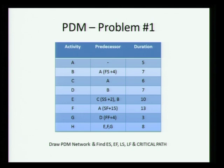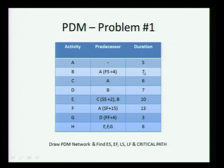Let us take up a problem which we will solve using these relationships. You have here all these activities A to H. When we say predecessor, it means for B the predecessor is A with a finish-start relationship with a lag of 4, and the duration of B is 0. So what I want you to do first is draw the PDM. Once you draw the PDM, we will see the network and then go ahead and start doing the analysis.